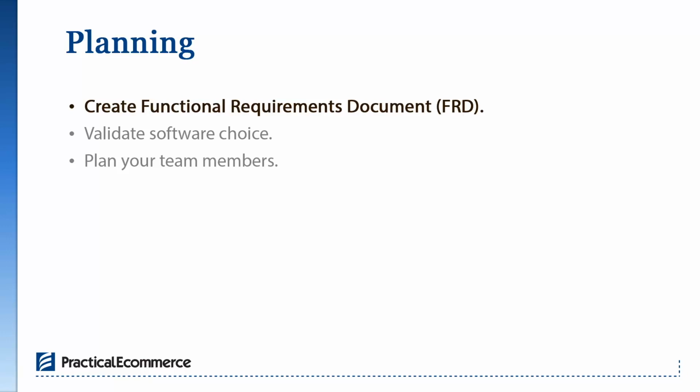That's important because in most situations, no one really has an unlimited budget, and so you'll have a lot of ideas about things you want in this new site, and it's good to understand what is the minimum that would be a place you could start from, so that if your requirements are more expensive than you have a budget for, you can understand how you can get the site launched with your minimum requirements and build other features in future phases. Or it can allow you to prioritize what features are the most important.